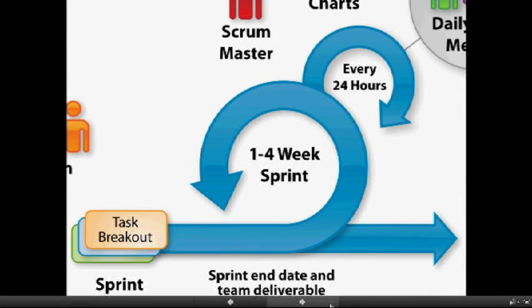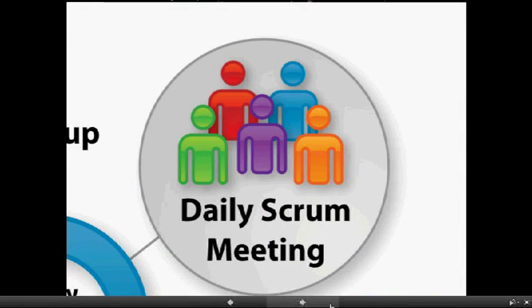After the product backlog is set, then comes the sprint planning meeting. In that meeting, the team comes up with a sprint backlog, which is like a to-do list to be completed during each sprint. Now, as the team knows what has to be done during each sprint, they start working on the project. And daily, the team meets up in a Scrum meeting. There, the team members share what they've completed since the last meeting, what they want to complete before the next meeting, and whether there are any impediments which might cause them to become blocked. These meetings expose risk and increase effectiveness.